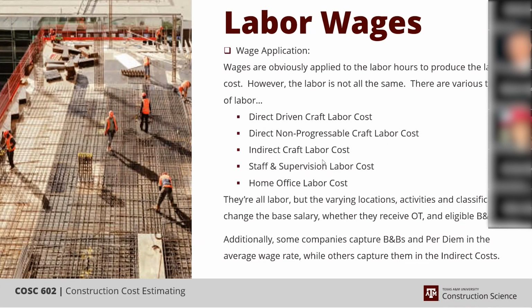They would pay them. And the thing is, in industrial, the standard work week is 50 hours. We don't work 40 hours unless the client forces us to, and often we convince the client that's not very smart because we won't get any craft. Industrial craft will not go to a job site if it's working less than 50 hours a week, because they want their overtime. So it's a no-brainer if the client reimburses it, right?